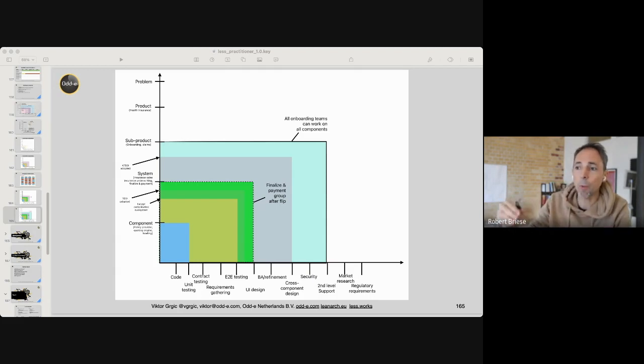So exactly as you said before I go to mapping up the flip and the part, I start looking and I ask people, even in my internal trainings, to pick up a few end-to-end customer requirements, write them down, and then look at where would you touch all the components, so that we look at 5, maybe even more requirements, see where we have interaction, see that we don't have to change all the components, and then what would be the first flip, and then I would create a group. And then I will see, later on, we might expand.